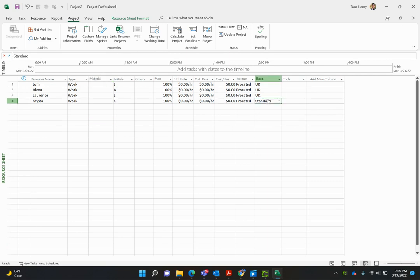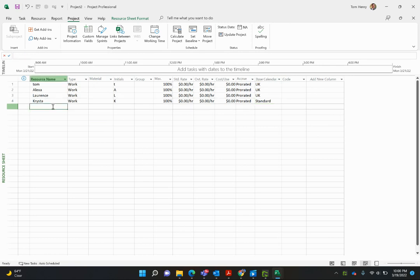Because whenever we put a task in as 7.5 hours for a day, if you assign somebody that works eight hours a day, that resource calendar is actually going to overwrite the project calendar. So you might get slight differentiations because you've got someone working eight hours a day on a task that's only 7.5 hours a day. So they're going to get that task done slightly quicker. That's just the trouble with having people working in different countries. So I always recommend sticking with one base calendar for your entire project. You can kind of just like, is someone in the UK that works on a task for 7.5 hours going to get it not quite finished if it's an eight-hour task versus someone in America? They're pretty much going to do the same amount of work. So let's not get too picky about it. Right now we have the calendar set up.